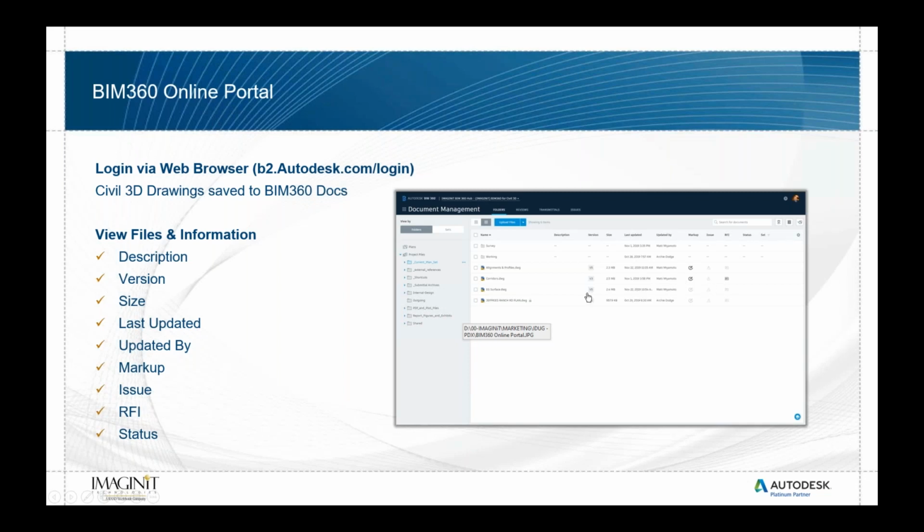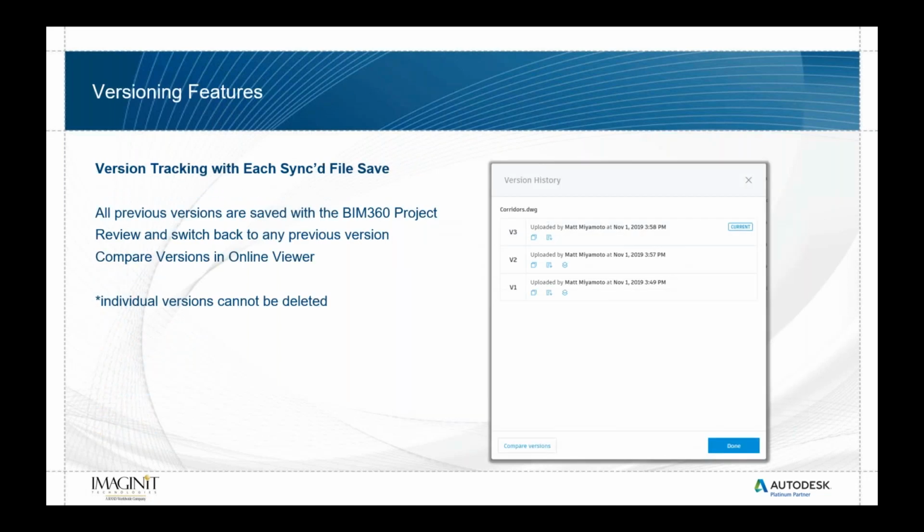of different things. Any issues or RFIs that are assigned to you specifically, you're going to get emails for, and these are all permanently tracked by BIM 360. So it's not going to allow anyone to go back and delete an RFI if they want to try and remove it. It'd basically be going back and saying that this one's not valid anymore, but it's going to live there as part of the project forever. There's no way to remove that type of information from the project tracking.